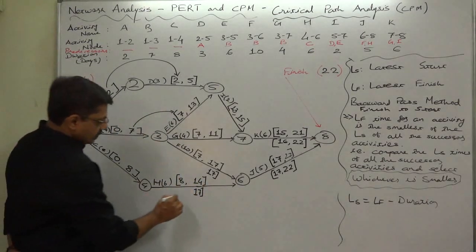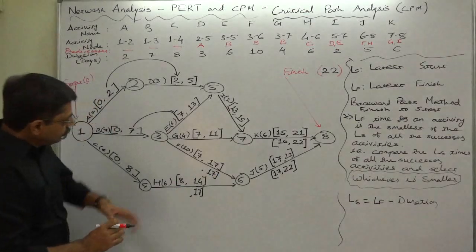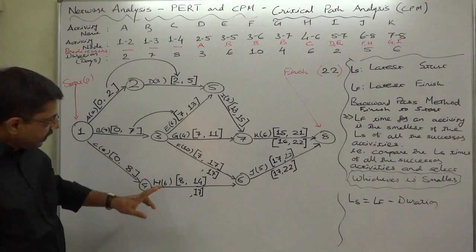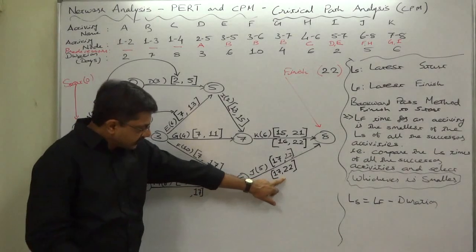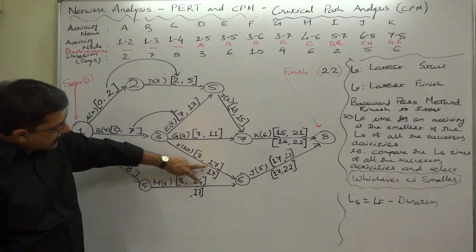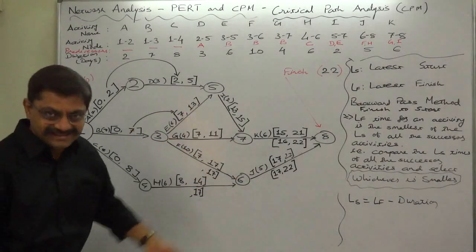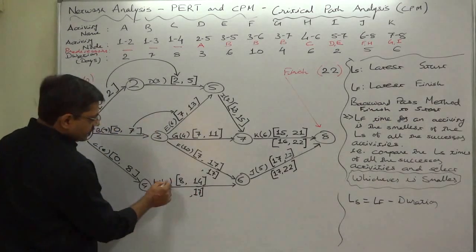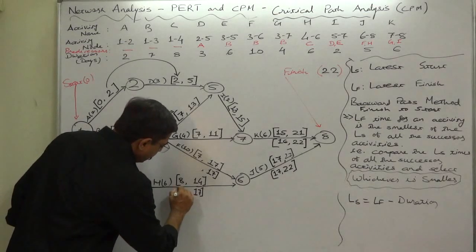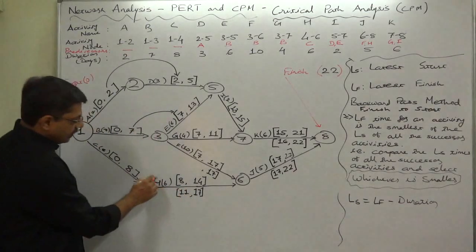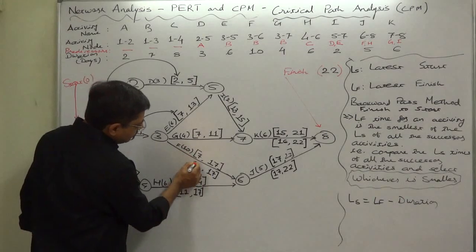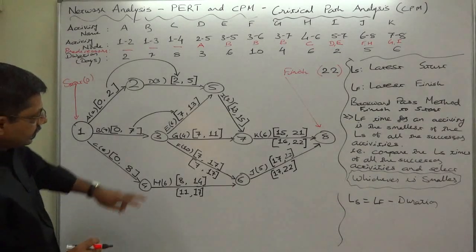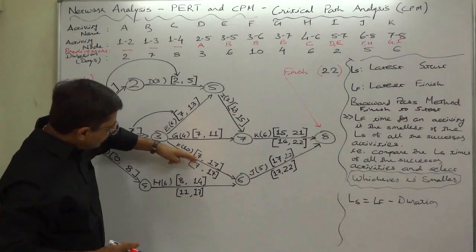These two activities have only one successor so there is no confusion. The latest start time of the successor becomes the latest finish time of the predecessor or predecessors. Latest start time equals latest finish time minus duration: 17 minus 6 = 11 is the latest start time of H; 17 minus 10 = 7 will be the latest start time of F.